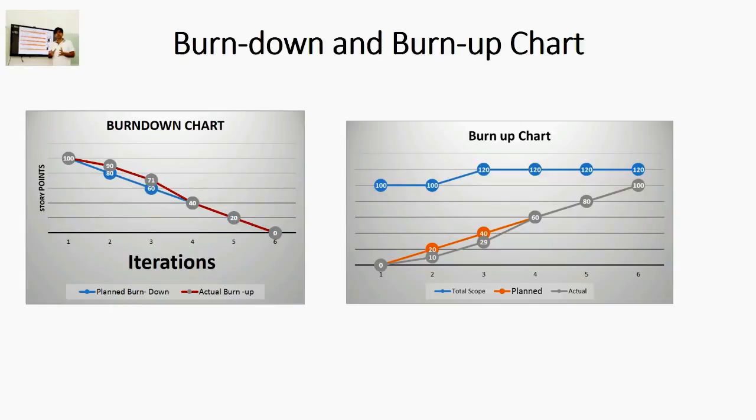This means as more work is completed, a burn down chart will show a progress indicator moving downwards to indicate the reduced amount of work remaining, whereas the progress indicator on a burn up chart will move upward to show the amount of work accomplished.